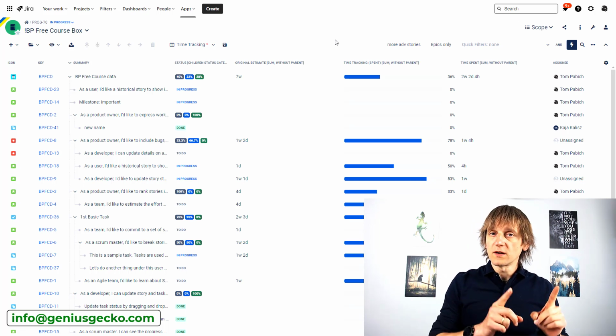Now, again, you can do it on the Gantt chart, but if you're working with a large data set, you know, thousands of tickets, then you also have to think about the performance of the app itself. And logically, because the scope module has a lot fewer functionalities, it will work faster. So if you come to work on the data over here, you will be rewarded with a faster response time. So that's one important thing to remember. Now, the second thing is even a lot better. The first one is just about speed. No big deal. Maybe you don't suffer because of that issue.